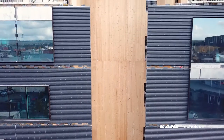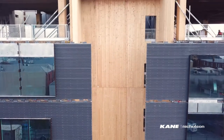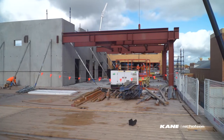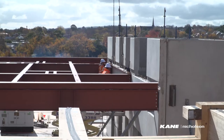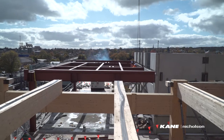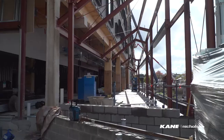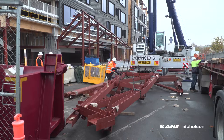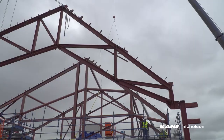of that. We're installing the north core precast panels on the northern end of the building for one of our exit fire stairs, and we're coming up to the last few of the north end. On the south end, we're actually starting to lift our roof trusses in that support the roof.